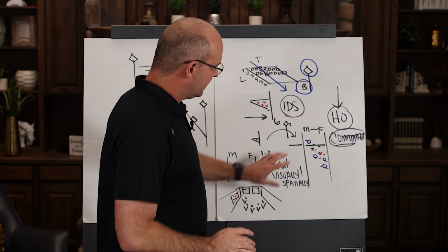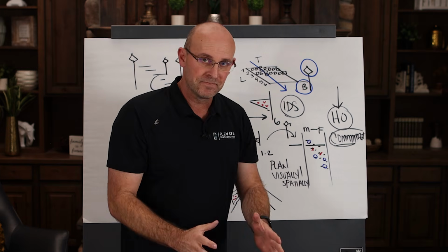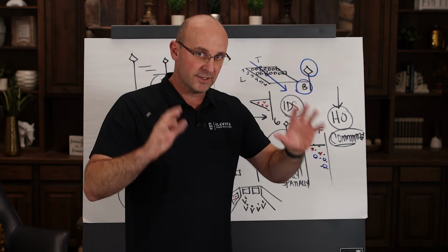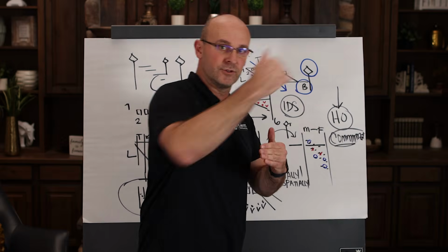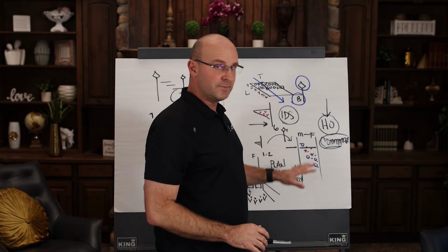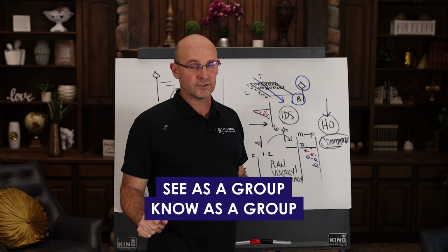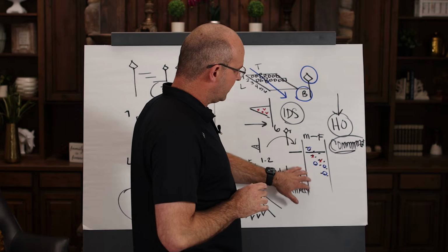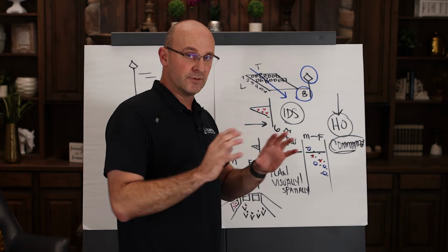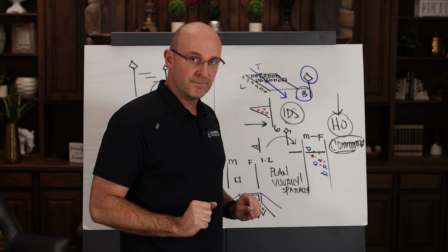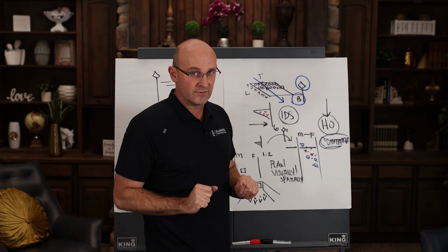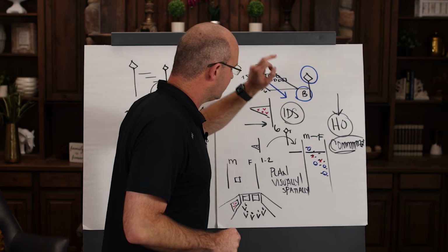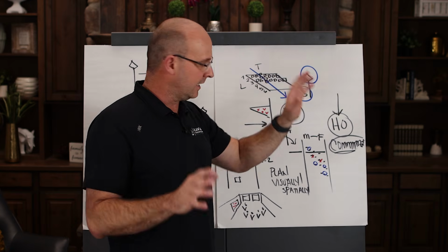And what happens is this plan, once coordinated, will go out to the field and enable your zone control walks and be the plan that you execute from now to 2 Fridays from now. And this is genius because everyone can now see as a group, know as a group, and act as a group. Now, what you have to make sure here in your weekly work plan is that trades have committed to it. It is their plan, their promises. It is adjusted for whatever they need, but it is still aligned to milestones and it still has the trade flow and you're still maintaining buffers at the end of the phase.